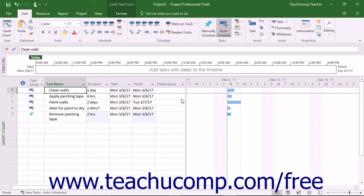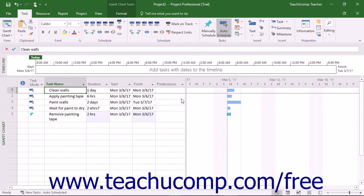There are four types of task links you can create: Finish-to-Start or FS, Start-to-Start or SS, Finish-to-Finish or FF, or Start-to-Finish or SF, which is rarely used.